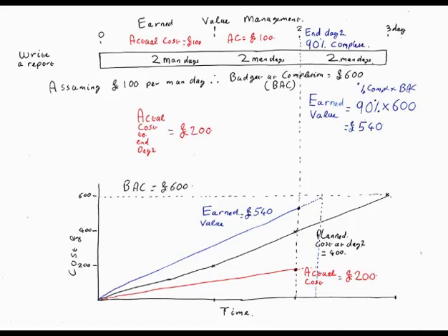But the problem with earned value is that earned value of 540 gets added to all the other work packages in this plan. So it gets camouflaged. So poor performance elsewhere might be masked. That's another disadvantage. Big disadvantage, that. So it's a bulk measure of progress. Just because you're doing well on that one might mean you've got all your good resources on one work package and rubbish ones everywhere else. Best people on this one and my not so good people on the others. So that's the other weakness of earned value, is that it smears out the performance across all the work packages.